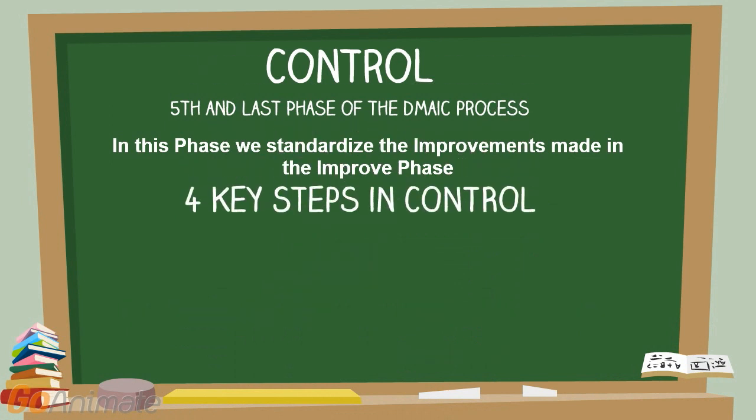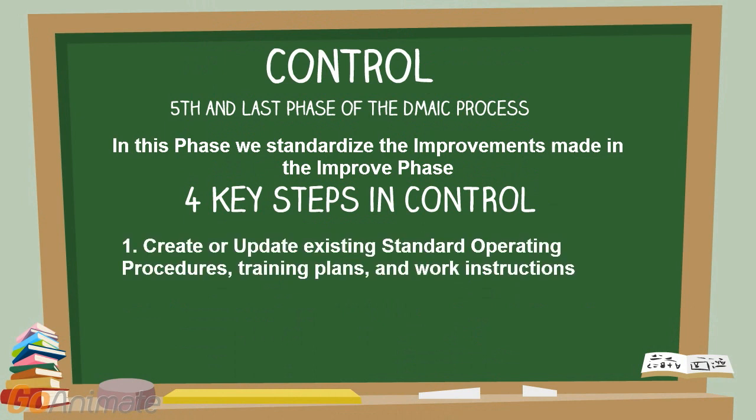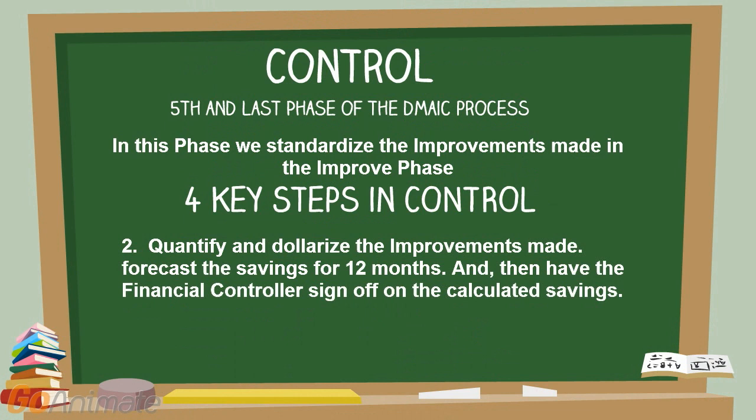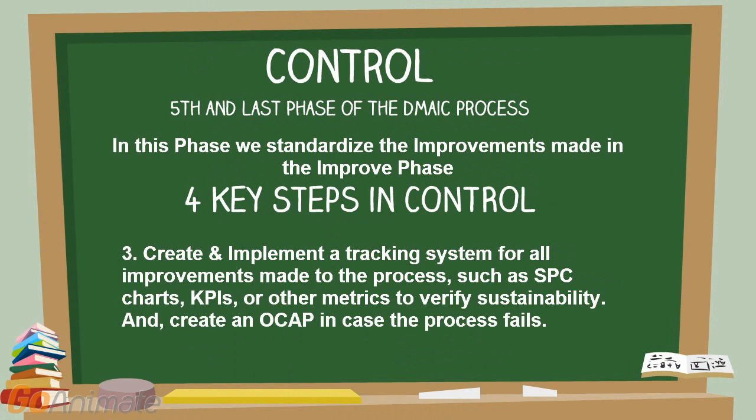If we summarize these activities into four steps, these would be: First, create or update existing standard operating procedures, training plans, and work instructions. Second, quantify and dollarize the improvements made, forecast the savings by 12 months, and have the financial controller sign off on the calculated savings. Third, create and implement a tracking system for all improvements, such as SPC charts, KPIs, or other metrics to verify sustainability.